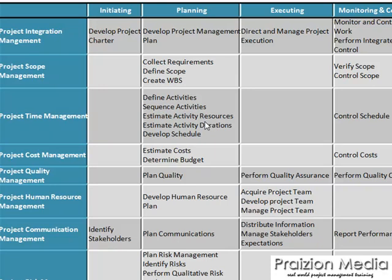Once you've got an idea of that, you move through sequencing the activities to estimating the actual resources that you need. In order to estimate the resources you need in a realistic fashion, you should know which resources are available — which again goes back to having some inputs from Develop Human Resource Plan. In addition, when you move into estimating activity durations, you need to have at the back of your mind different risk scenarios that might occur in the project. As a result, you need to have started planning risk management.